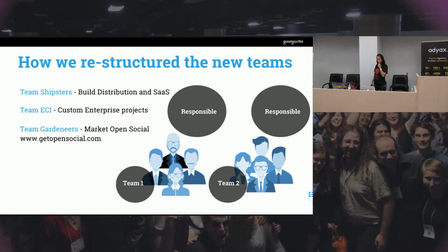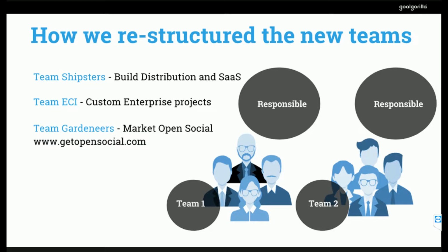So I think in October, November, we said, okay, this team is becoming way too big. We cannot handle it anymore. There's no overview. How are we going to restructure it? And it was not an easy case of, okay, we're 12 people, now we create 2 teams. Because in the ideal team, you have to represent every discipline. And in our case, we only had 1 front-end designer, so we didn't want to put him in 2 teams because that would double his meetings and double his focus areas. So we first had to add a few more to our team before we could make the split. It took a while, because you have to have the budget to add more people to your project, and you have to have the capacity, of course. So luckily for us in November 2016, it was the time.